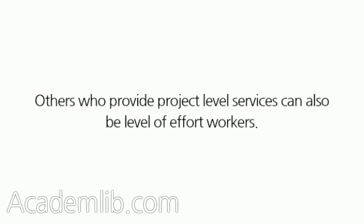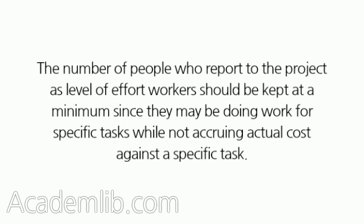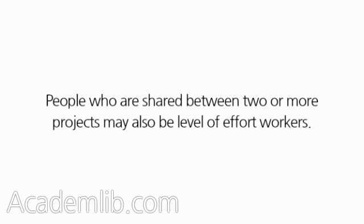Others who provide project-level services can also be level-of-effort workers. The number of people who report to the project as level-of-effort workers should be kept at a minimum, since they may be doing work for specific tasks while not accruing actual cost against a specific task. People who are shared between two or more projects may also be level-of-effort workers.